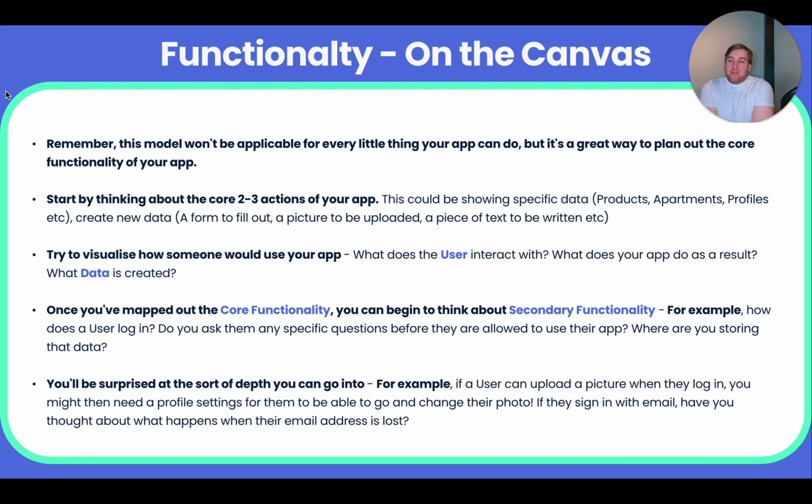One of the things that I think often surprises people is, and actually if you've ever worked in software before, or worked in some sort of project management, particularly in software, it is so easy for something to take longer than you think, to go over your timeline. Because when you say, okay, I want to have a sign-up functionality, most people will go, okay, so I need a box for the email address, a box for the password, a button to sign up, and I'll add them to the database, done. But that's not strictly true, because actually you need to think about, well, how am I going to validate the email address to make sure it looks correct? Does my no-code tool do that? Do I have to implement that myself?